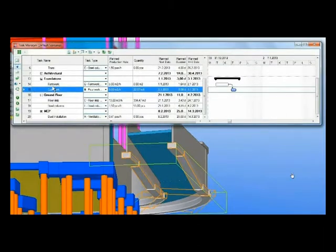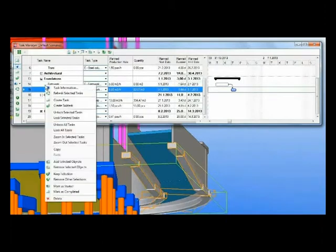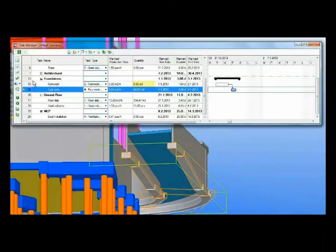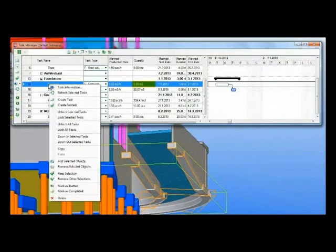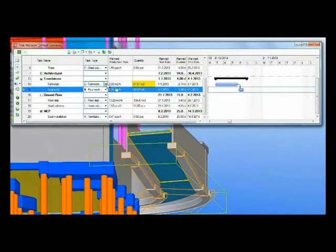Of course, if you select a task within the Task Manager, it selects the elements it refers to. It's linked. It's completely linked. And so you're not just typing in numbers of volumes of concrete given to you from an Excel sheet. You're actually taking directly from the model that you're going to be constructing from. Extremely clever. Very handy. There you go, all your cast work. All your formwork, of course, is taken from the exact same elements. The formwork's taking the vertical faces of those, and you can see there how these things are all updating automatically.